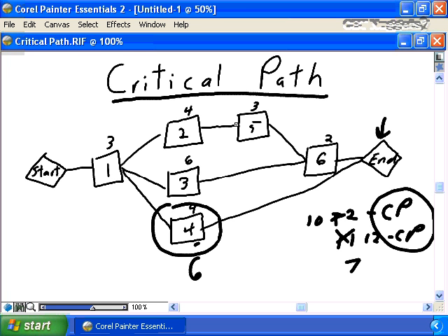To understand which tasks are on the near critical path, your project management software will also do a calculation for you, which will determine a value called slack. The closer the slack value for each task is to 0, because tasks on the critical path will have a slack of 0, the closer to the critical path it is. In this original instance, task 3 would have a slack of only 1, meaning it's on the near critical path, and the farther the slack is, in this case the slack would be 5, the difference from 7 to 12, identifies that they are not near the critical path and therefore need to be managed appropriately.